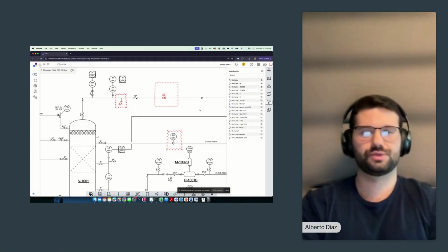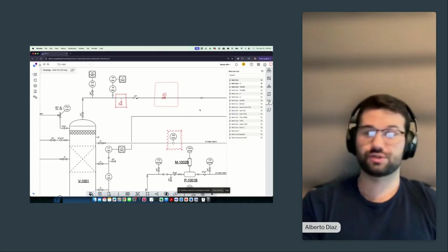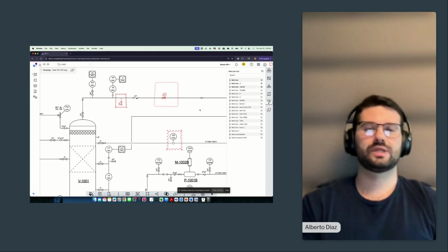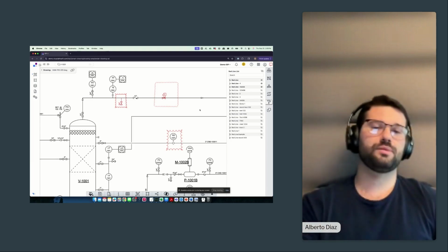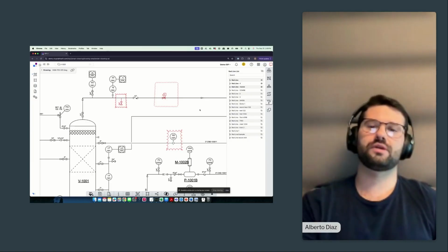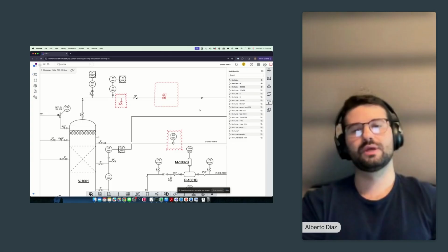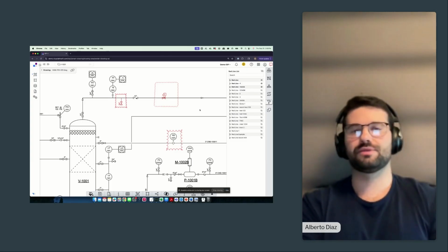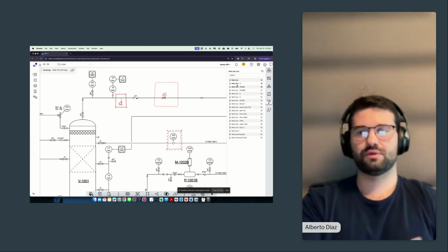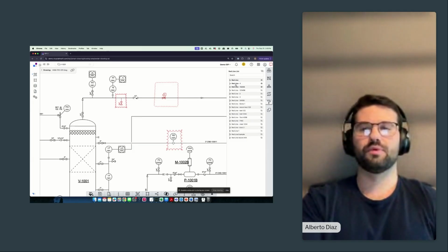What this allows you to do is to electronically catalog these red lines, understand who was the person who did the red line itself, the date in which it was executed, and essentially introduce it as part of the MOC process and send a notification to, say, the drafter or the document control person in charge to offset or start out the management of change process to execute the change on the master CAD file. So this is an extremely powerful component of the IDP tool in order to sustain the program moving forward.